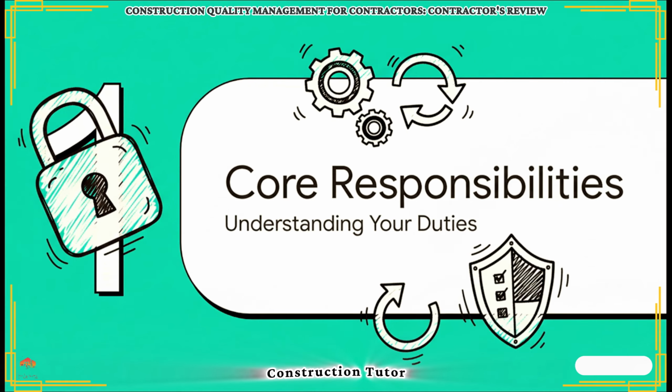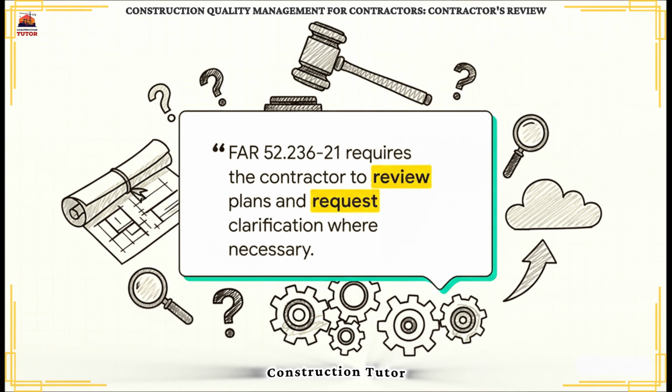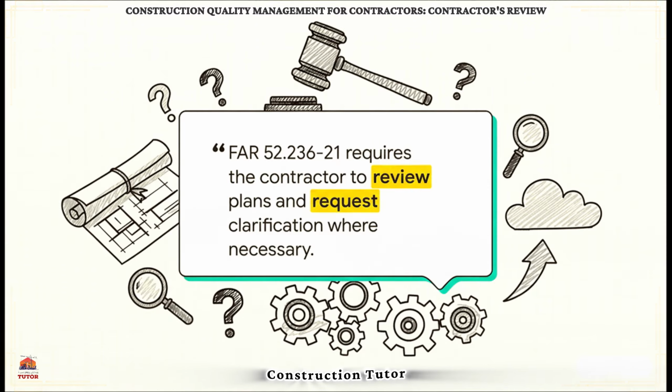The whole idea of the Contractor's Review really hinges on one fundamental rule. And I want to be super clear here. This isn't just a friendly suggestion. It's a legal must-do. Now, this clause has some serious teeth. It's a Federal Acquisition Regulation, or FAR, and what that really means is that reviewing all the plans and specs isn't just good practice, it's written into your contract. It's a mandate. Getting this right at the very beginning is what saves you from massive headaches and costly delays down the road. Your first job is to understand, to question, and to clarify.